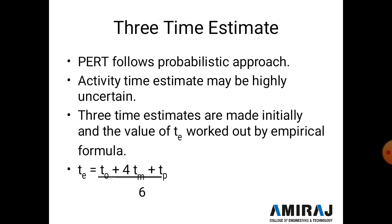PERT follows the probabilistic approach, where the probable time is not a final fixed value — it can be higher or lower. Activity time estimates may be highly uncertain, so three time estimates are made initially, and the value of te is worked out using an empirical formula. This formula is important for both CPM and PERT network diagrams.